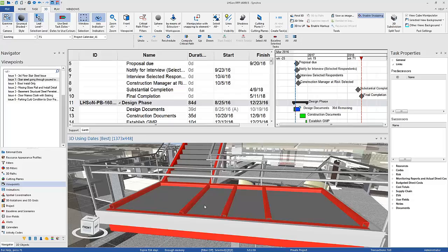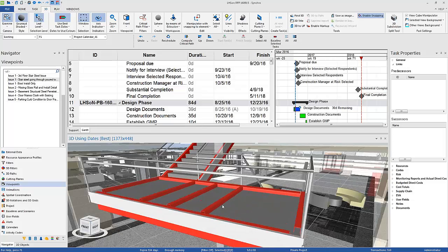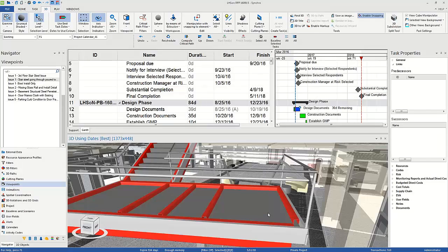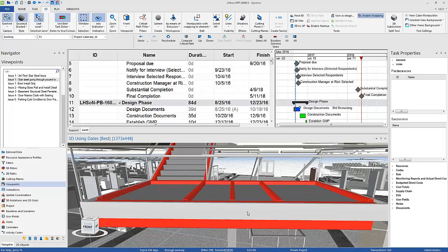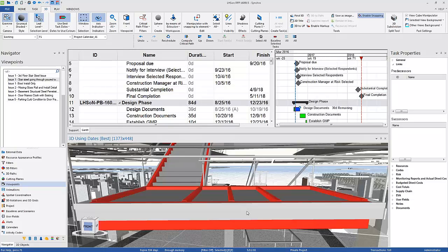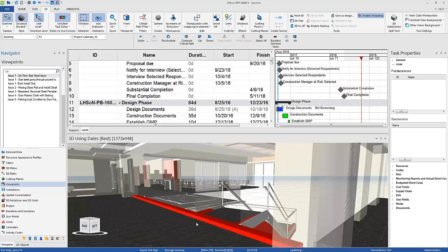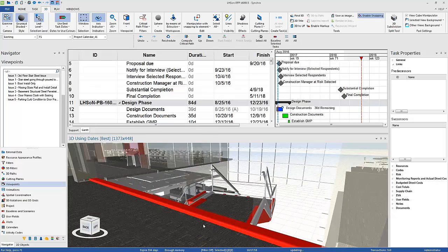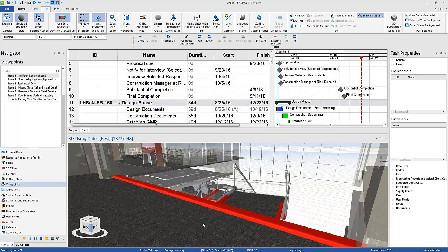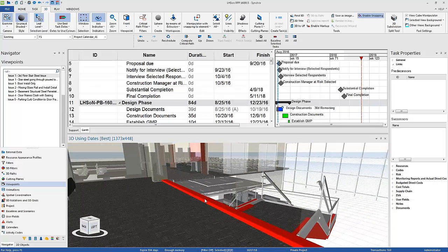and you start looking and seeing, oh man, this certain thing looks wrong, or this certain thing looks right. This is one of those things that was just a miss, and the structural engineer right now is having to redraw, and we're having to rethink how we build these stairs because it's probably not working. And even on the top level, you can see the stair is coming through the carpeting. Obviously the steel support is not going to work.